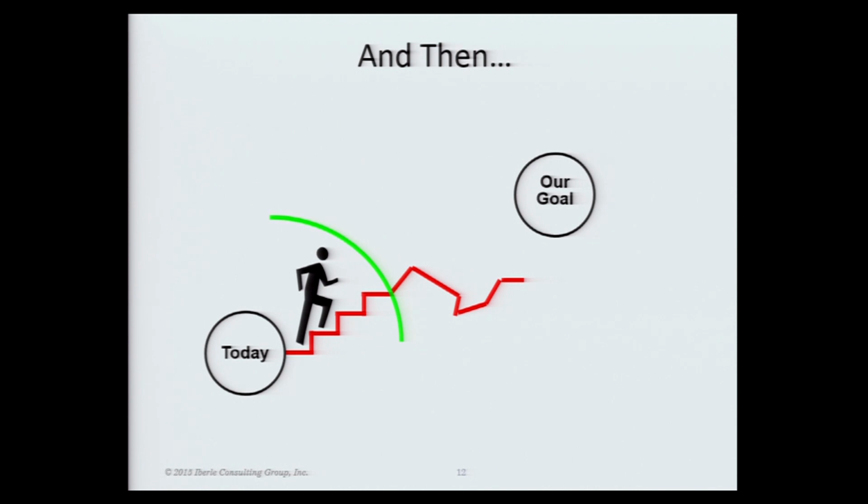And at that point, what I see especially in large companies, is one of three things happens. One thing that can happen is they conclude that they get up to that point and they stop and they replan. And so they throw away the planning that they did and they replan. And they go along until they hit another threshold, and then they stop and they replan again. So you're replanning over and over and over.